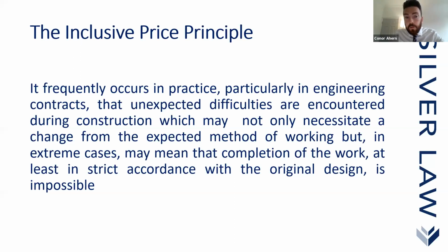And I used to find that schedules of clarifications included within the contract documents were very useful in order to clarify what it is that we were assuming as a contractor. And obviously, what you're doing there is making a clear statement to rely on in future if any changes are required, and it will make it easier then to substantiate any additional time or money applications. But this is basically the inclusive price principle, and it's like a school of thought really for contractors to get their head around when dealing with design and build contracts.